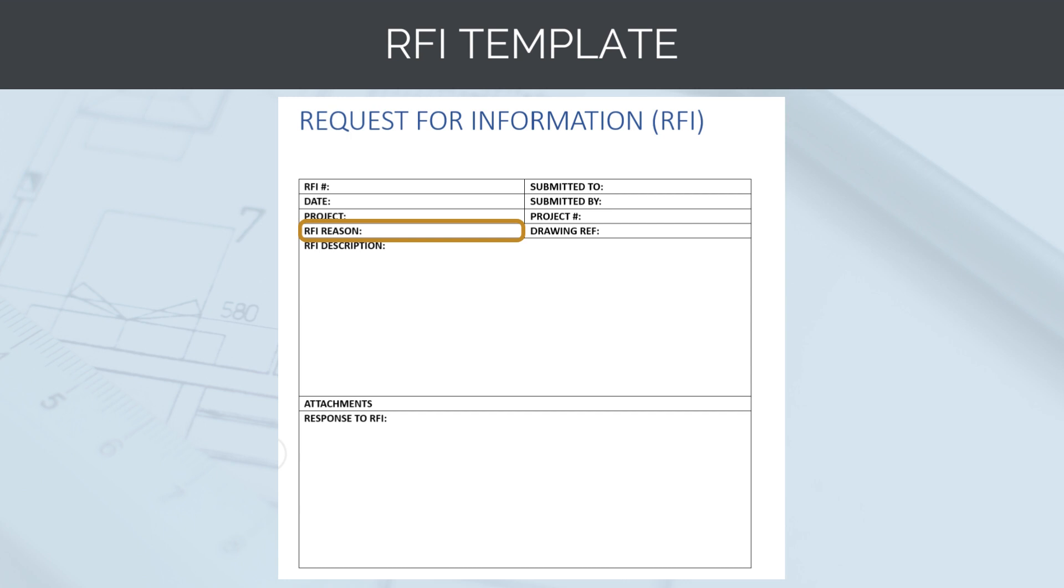Every hour of work the designers do costs money. If it takes eight hours for two engineers to prepare an RFI response, there is obviously going to be a significant cost associated with this. If the RFI is because of a design error or omission, then the design consultant will not be paid additionally for this. If the RFI is because of a proposed value engineering change, then the design consultant will be paid for the hours they have worked on the RFI.